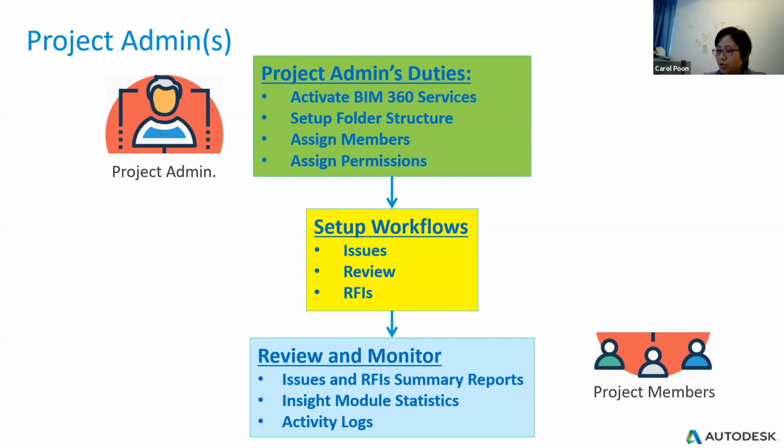Basically, when you are operating a building project, you may need to do markup and issues in BIM 360. So what is markup? Markup is just you highlight some problems on the drawings or the model so the others can see the problems, but it means nothing, because if you highlight something, no one will follow up if you haven't assigned this task to specific people. So if you do an issue, you mark or highlight your problem and then fill in some description, and then you can set the due date and set the person to handle this problem. And this person, when you create the issue, he or she will get an email about this issue.